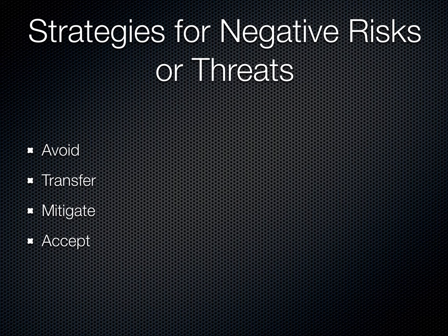Transference strategies in brief shift the risk to a contractor, however this risk has not been eliminated. It simply takes the risk off us as an engineer, as it can be insured or guaranteed in the form of a contract from a financial point of view. Mitigation, on the other hand, reduces the risk probability by implementing precautions such as using a less complex method, conducting more tests, or even choosing a more stable supply.